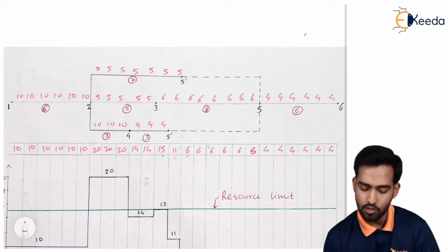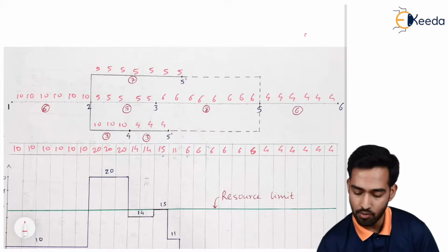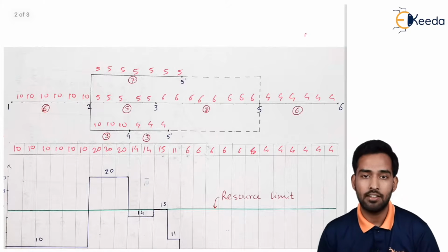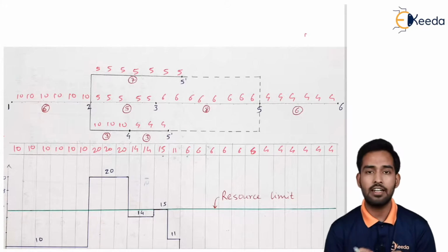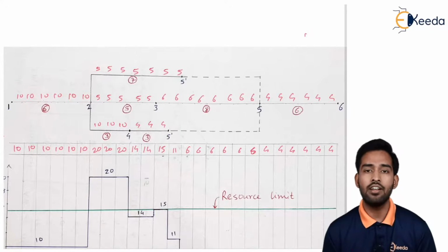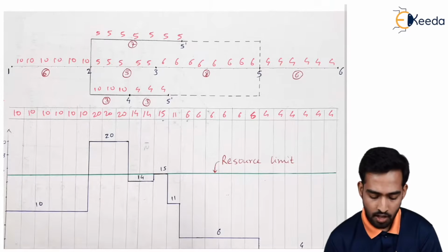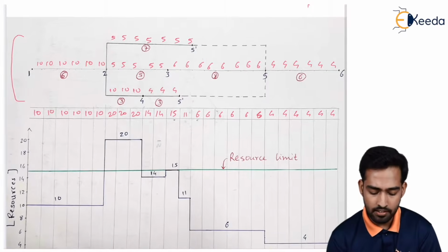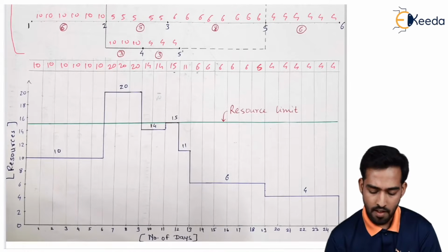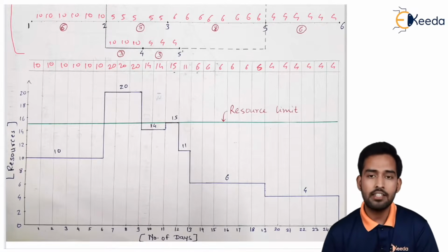So likewise we have to calculate the total number of machines required by using your critical path. As you have seen, I have kept the critical path on a single line so that we don't have to disturb it, because we don't have any float available on this critical path. Now I have represented this in a bar chart. Why is the bar chart important?